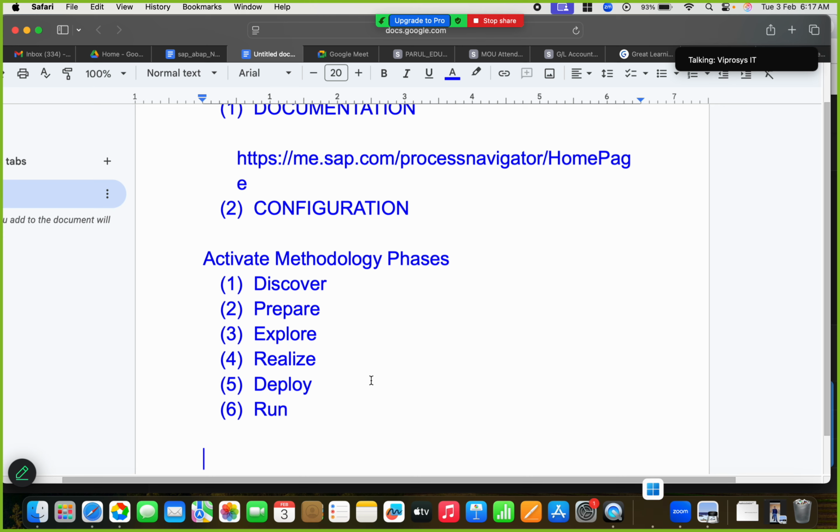Then we have the realize phase, wherein the project team adopts an agile approach to iteratively and incrementally build the functionality from the backlog. Basically, in the realize phase, implementation used to be done first, and the testing used to be done later. But right now the testing happens in parallel, every 1 week, 2 weeks, 3 weeks or 4 weeks; we have an iteration of testing. Whatever we prepared till now, we test everything together, and then we keep growing on it. It is an incremental process. This is a very important concept which was adapted from the agile methodology.